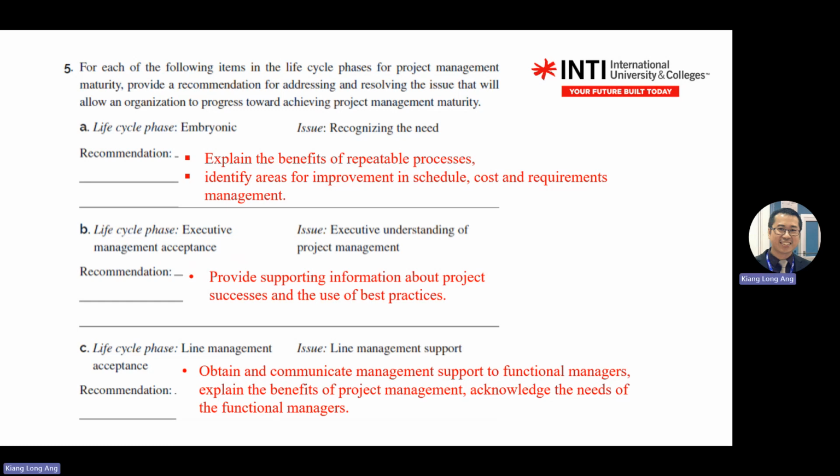That means: do you have the information on the cost, the time, the quality, can we make it or not, and so on. Because top management makes four types of decisions: proceed without changes, proceed with changes, wait and hold for more information, and cancel. So here you have an issue of understanding why you need project management, why they need you, or why we need these projects.